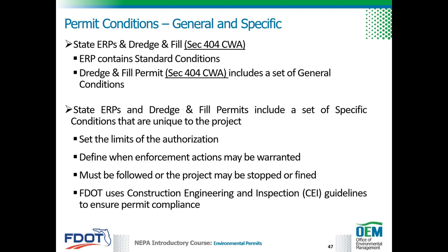Permits include a set of conditions. Permit coordinators must read all permit conditions for every permit issued and coordinate with appropriate offices to address unusual permit conditions before project letting. The Environmental Resources Permit, or ERP, contains a set of standard conditions, and the Dredge and Fill Permit includes a set of general conditions, most of which are procedural in nature.